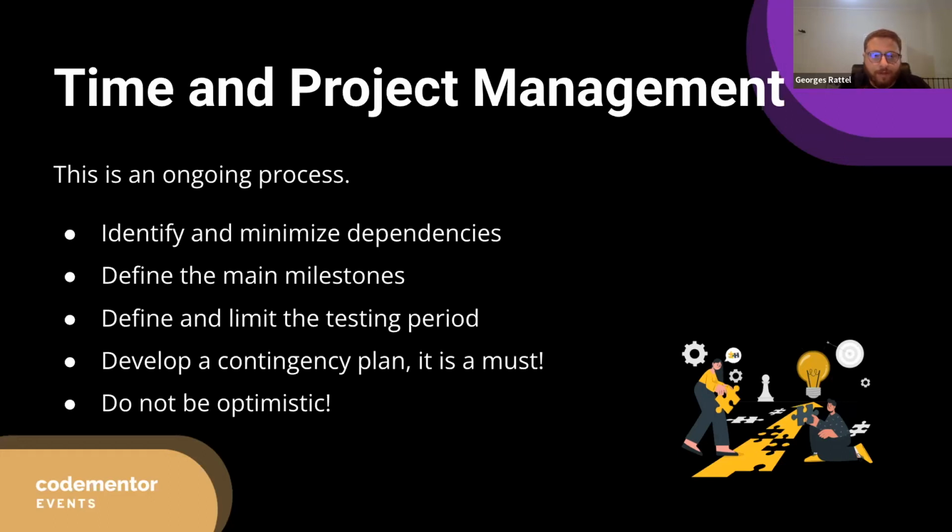So when you identify these dependencies and you make sure to handle them before you start, or you make sure that the client is 100% aware that at this date, if these details are not available, then a delay will happen in the project. It's an inevitable thing, and there's nothing you can do to avoid this. You have to address it from day one. Same thing for anything else, as simple as a Facebook login integration, Google integration, whatever it is.